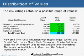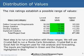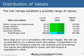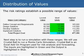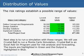Once we understand that distribution, we put it into a risk simulation model. The tool I use is called CrystalBall — it shows up as an Excel add-on. The input values appear in green on the Excel spreadsheet, and the forecasted value — what we're trying to figure out how much to budget — shows up in blue. Then I run the Monte Carlo simulation, and the results come up on the next slide.